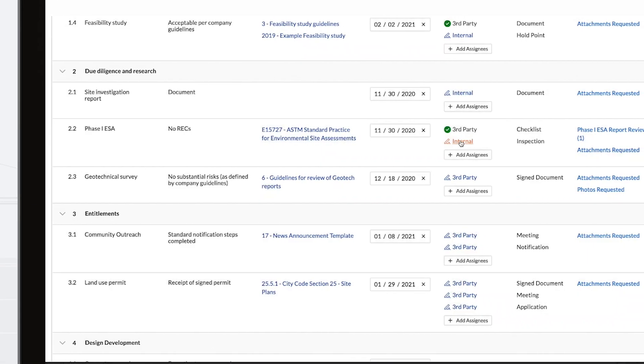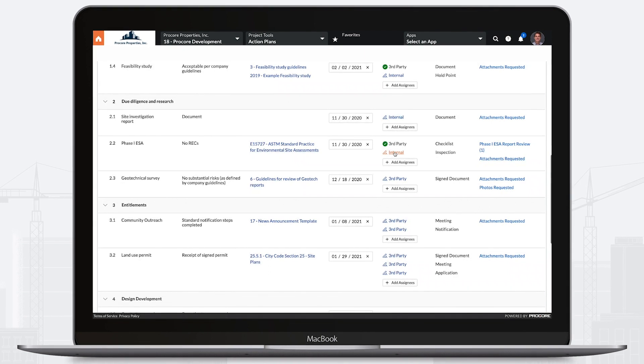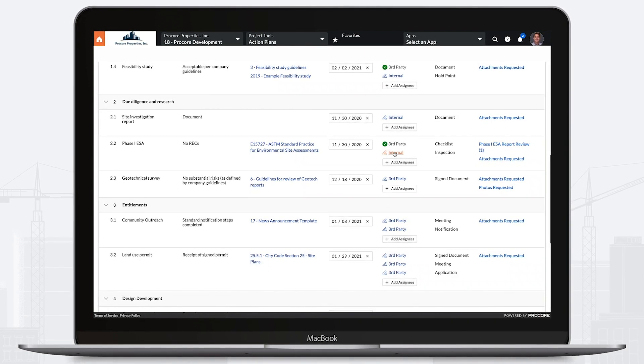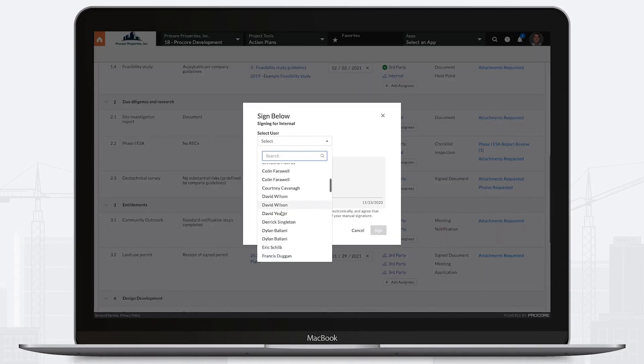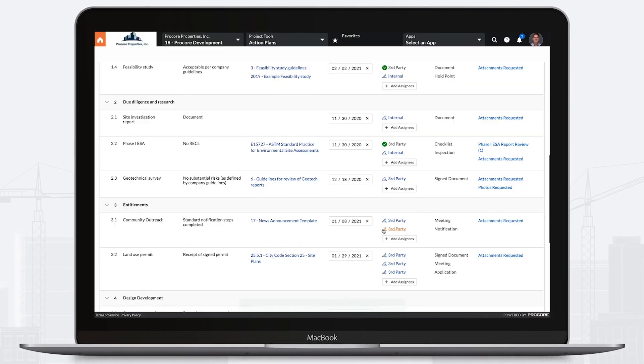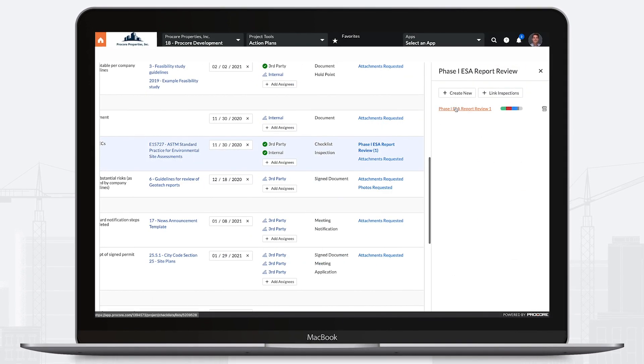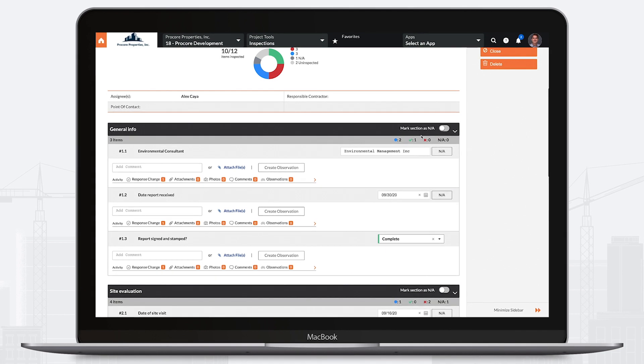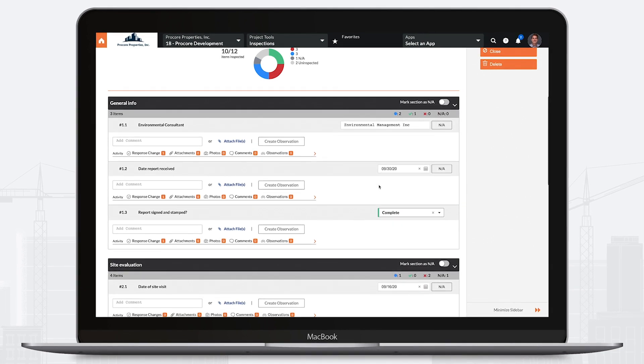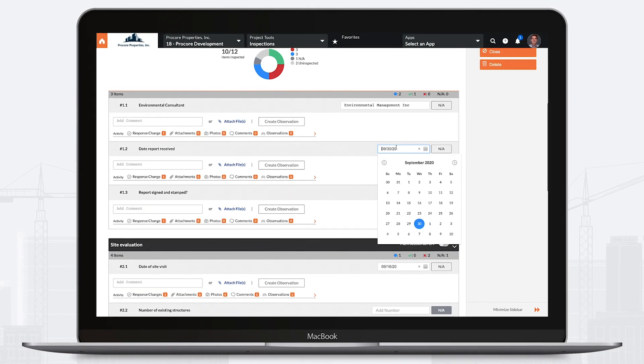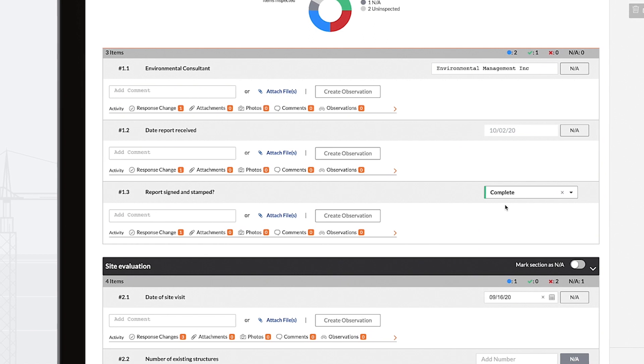Action Plans enables you to implement a phased approach to project development and execution by organizing information, requirements, and accountability in one central location. This solution allows you to establish control checkpoints that make it easy to verify compliance with requirements before moving on to the next step.